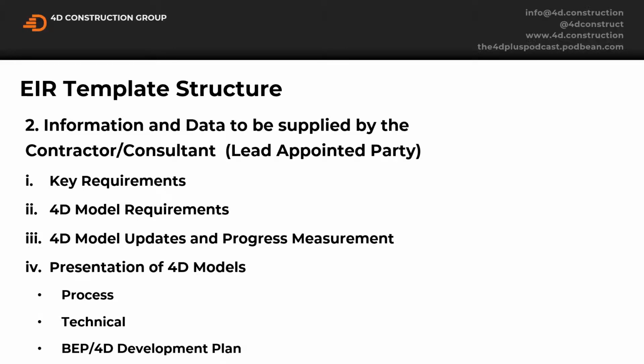Not all of these software packages are backward compatible. So for us to open and review the models that we've paid for, we need to upgrade our software. That can have a detrimental effect, because then we need to upgrade all of the 4D deliverables that we've produced as well, and understand what the consequences of that might be.